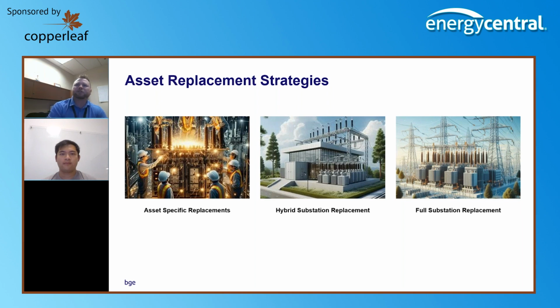And then I think the last one is pretty straightforward, but maybe not one that typically came out of a system performance or aging infrastructure budget in the past, which is to be able to evaluate, hey, everything in this station is old. If you go through and replace all the assets, you're still going to have potential grounding issues or control cable issues or control house issues that need to be addressed, and you're going to spend capital. So if you bundled all of that together and looked holistically at the value of that compared to what it would take to do that, do you start to pencil out some projects that make sense?